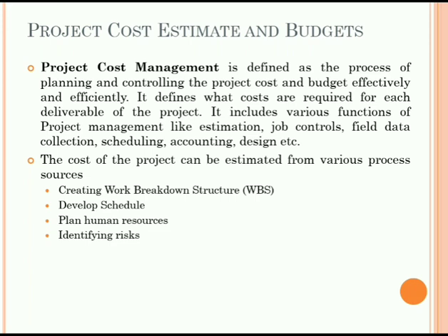If the project has to be completed in a fixed period, how best can the available resources be utilized for the purpose of achieving the different goals? In such a situation, it is necessary to have proper resource scheduling to achieve any one of the different objectives. That is, if the project duration is fixed, to level or smoothen the resource demand in such a manner that peaks and valleys in the demand are avoided.